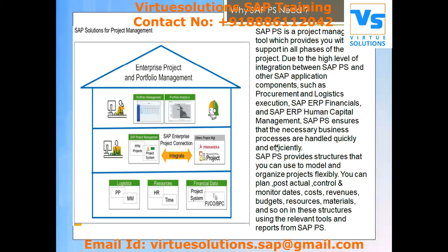We have different modules that we're going to integrate, and we're going to post the actuals. So in a single dashboard we can see what is my plan cost, what is my plan revenue, what is my actual cost, what is my actual revenue, what is the variance in between, what is the percentage of completion, what is the EAC, what is the BAC, and ETC. Every sort of information I can see under one single dashboard. That's the reason we require the project management tool. So for our case, we are learning the SAP PS module.